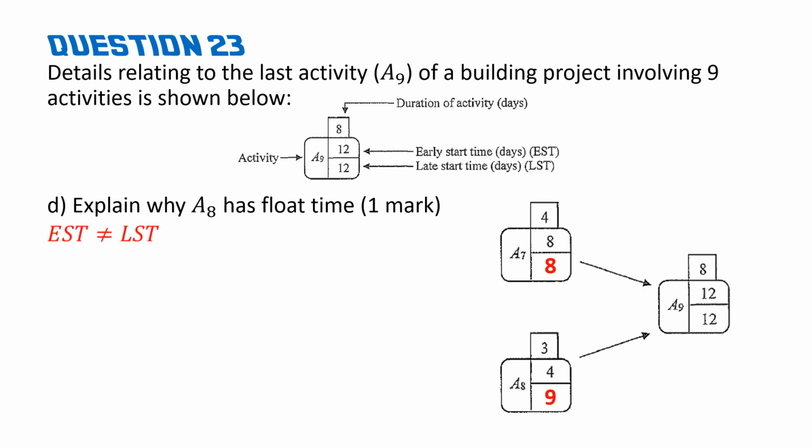So we could say that EST is not equal to LST. It doesn't ask for it, but we could go on to say it's got a float time of 5 days. That's just the 9, our LST, minus the 4, our EST, which is a difference of 5.